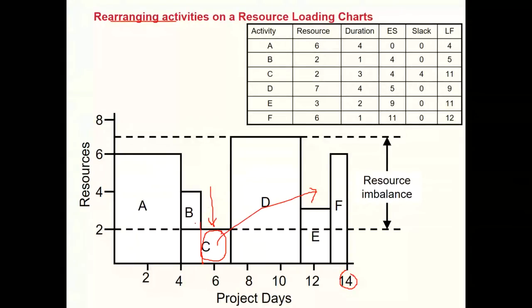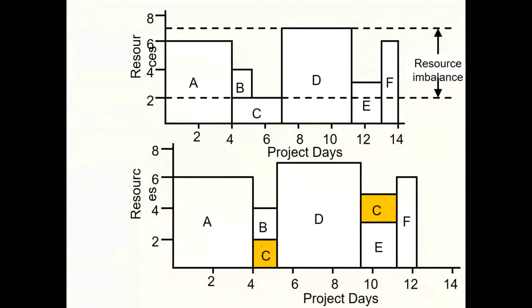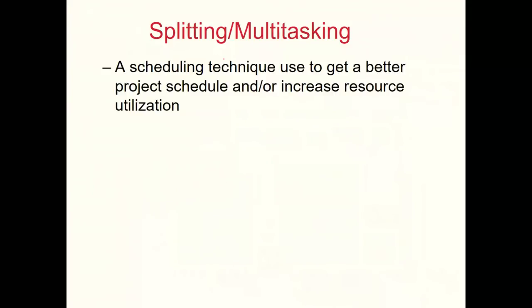So here the decision is taken to split activity C into two smaller components, with the first section delivered here and the second one delivered in parallel to activity E. The impact is an overall reduction of 2 weeks in the project duration. So splitting an activity could again be seen as a project time and cost reduction strategy. But we should not assume that splitting comes without any waste.